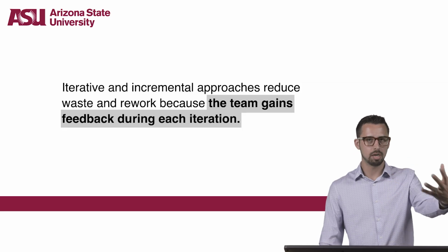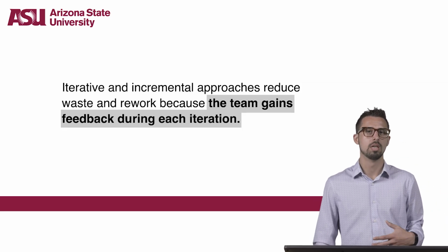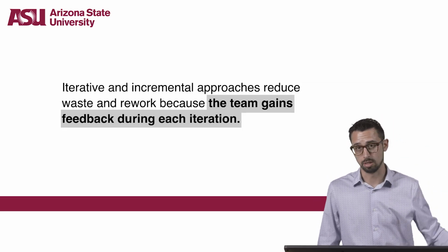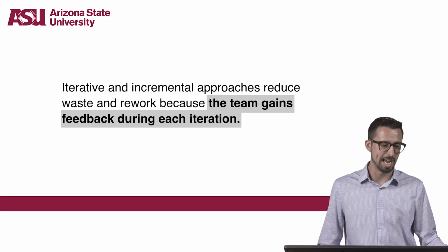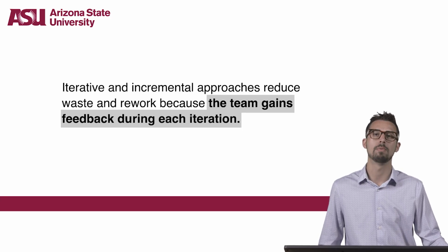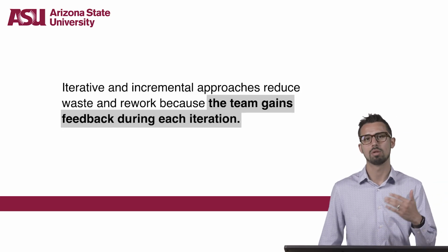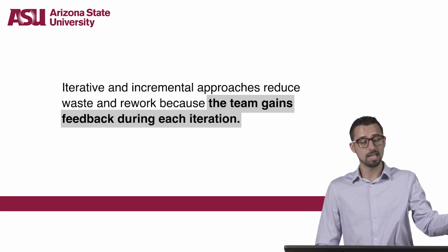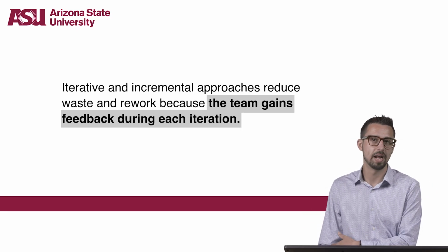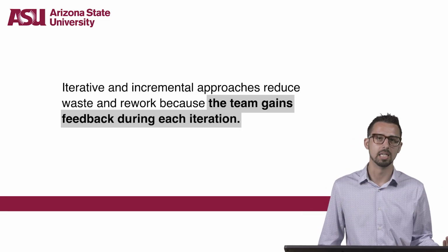And these iterative and incremental approaches do wonders at reducing waste and rework within a project because the team gains feedback multiple times throughout the project, at each iteration, rather than waiting until the project launches at the very end.